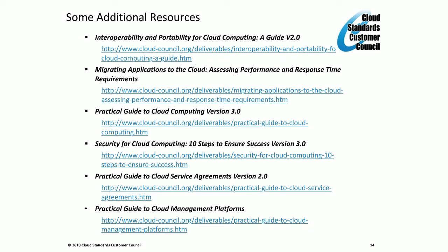But when you are doing a high risk migration or high complexity application migration, I would really try to do this mock and make sure everything is working: performance, user access, backup recoveries, whatever I mentioned in this slide. That's very important. That actually helped. We found some issues, and we were able to address those quickly.